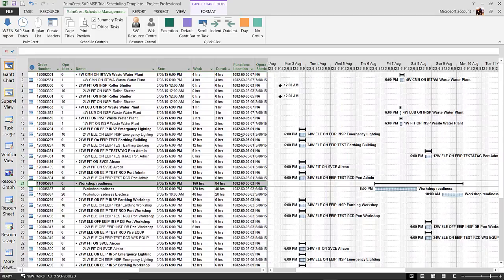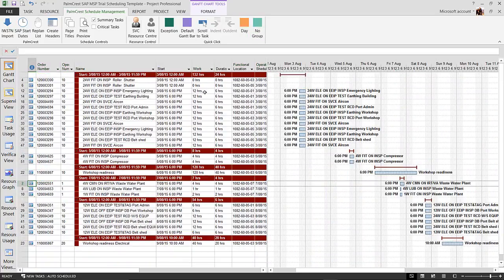So we can see here all the data's come in, and I can group it by day, and it puts it in order, and straight away I can see what's happening in those weeks. It also shows me how much work I've got planned for those days right in there, and I can see that easily. So I know if my capacity is 80 hours a day, I'm a bit overcooked on the Monday, well undercooked on the Tuesday, if that's a Tuesday, and I can move this work around to accommodate, and it's very easy to do that.